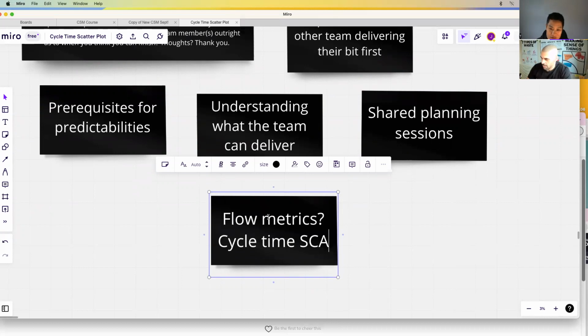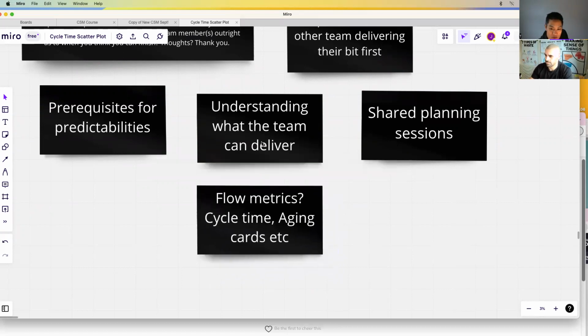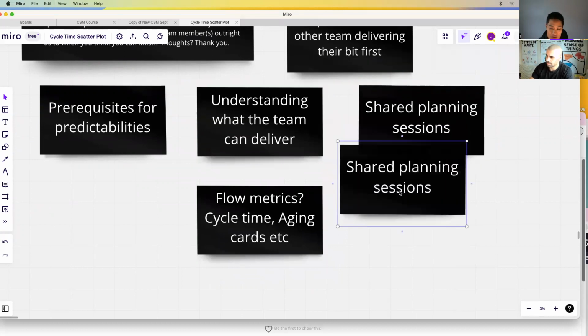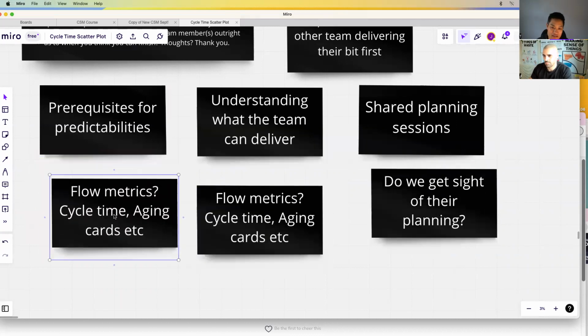So it's as simple as that, to be honest. I would just make the date very clear to the team, speak to them, can they meet it? And then I'll try and inspect. It depends on how close you are with the other team, but are they a stable team? Are they working in a predictable way? Have they met their dates in the past? Do we need to give them a bit of buffer ourselves? If they've given a date, do we need to say, look, let's expect it a sprint, 2 sprints after what they say? So I'd try and assess what's the level of risk of them meeting that date or not.